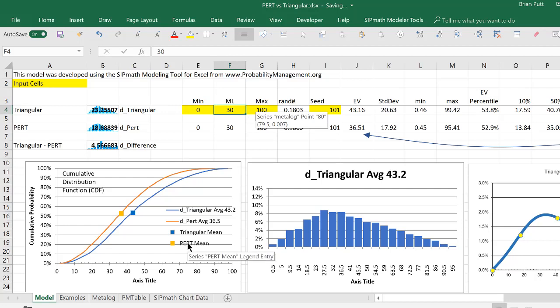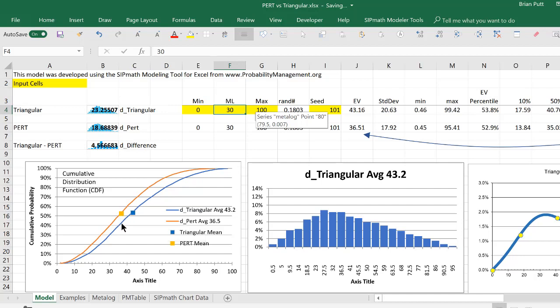And in that situation, you can see the PERT has a lower value. And this may be why people prefer the PERT, because they're looking for something that's better to demonstrate. Or in fact, maybe the triangular is a better one to use, because it compensates for some of their biases.